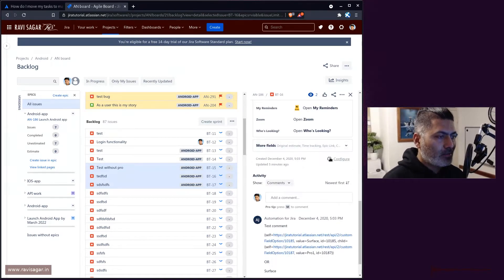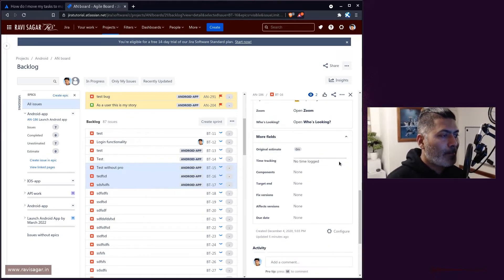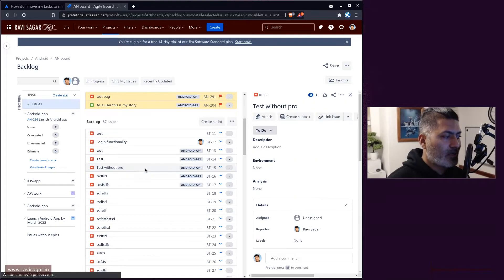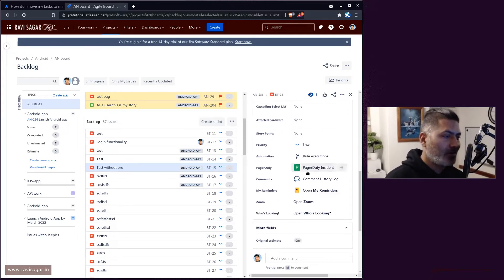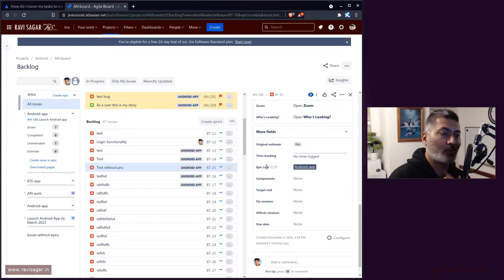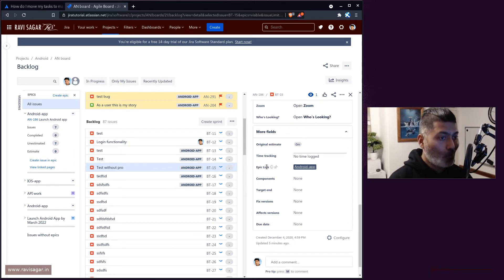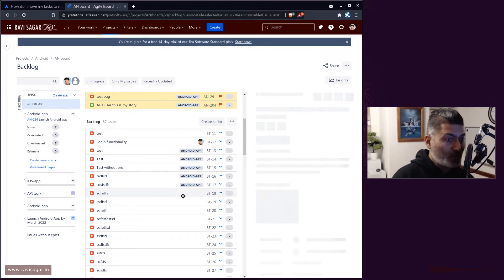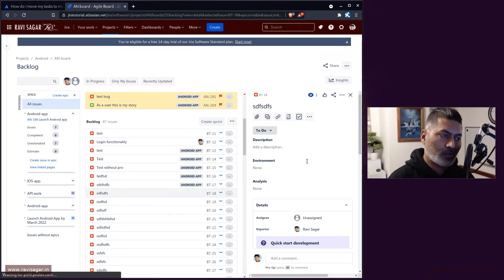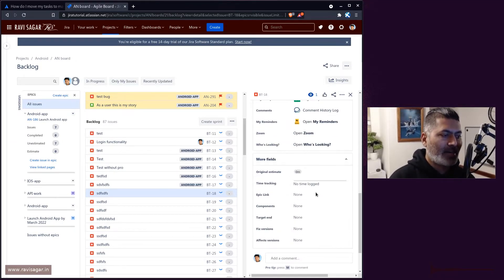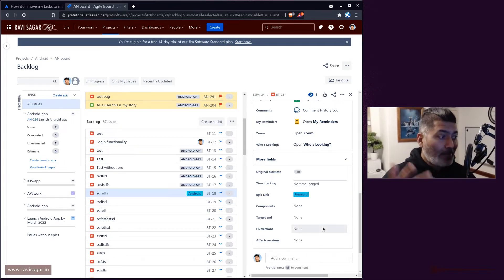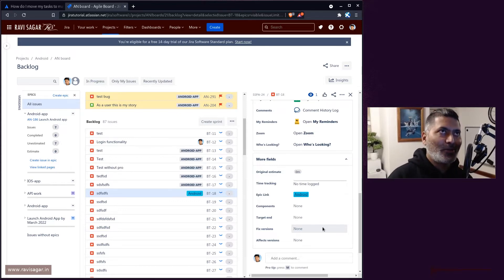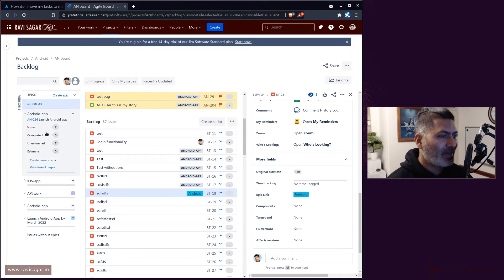If you open any of your issues, there is a field called Epic Link. This association happens using the Epic Link field. You can also update it directly on the issue — just open the issue, scroll down, find the field called Epic Link, and then you can associate that issue to the epic you want. This will be reflected not only in the backlog view of your board but also in applicable reports.